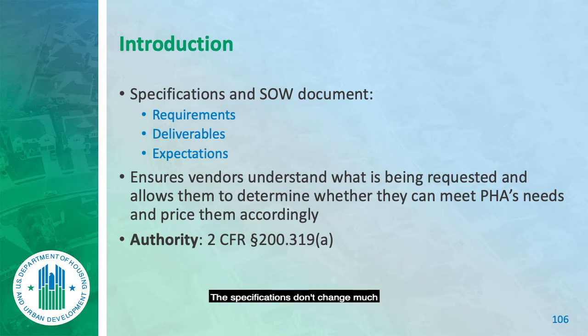The specifications don't change much because I use what the architect did as an attachment to the bid. But here's the issue about specs. You will see right here that I have an introduction, I have rights, then I have scope of work. Now, anything pertaining to the work that they're to do during the contract phase is going to be included in this section right here. It might also be on an attachment referenced by that section, but I'm not going to put the scope anywhere else in any other section.